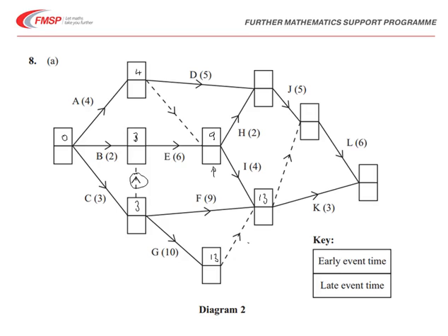The top event is 11, that's the 9 plus H, giving us there a total of 11. The 11 plus 5 gives us 16, just checking the dummy activity in there again, but that's not going to make any difference to that one, because it would give us 13, so the longest path to here is 16. And then finally that 16 plus 6 is our longest path to give us 22.